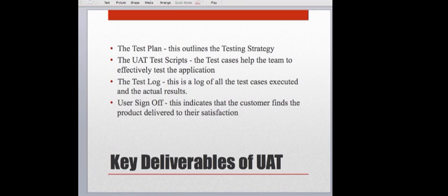Let's look at the key deliverables for user acceptance testing. There are 4 things here that are important. Obviously, the test plan, which outlines the testing strategy, and the UAT test scripts, right? You've got to be able to hand them some test cases so that you can help them to effectively test the application. Again, you want to give them that period of time where they can just play with the application.